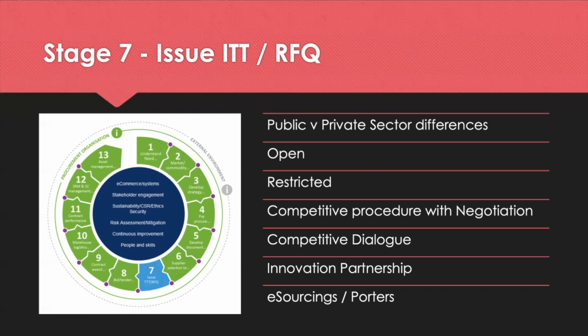So at this point, what you might want to say in an exam question about tenders and quotes is that there is quite a lot of difference between the public and private sector in terms of the formalities and rules around issuing documentation. Sorry, the public sector is far more legislated than the private sector. And the different procedures could be open, restricted, competitive dialogue, competitive procedure with negotiation, innovation partnerships. And even here, you might want to talk about the use of technology. So you could talk about e-sourcing portals.